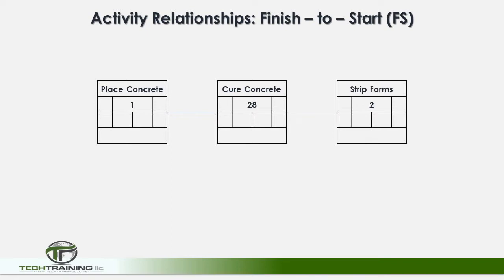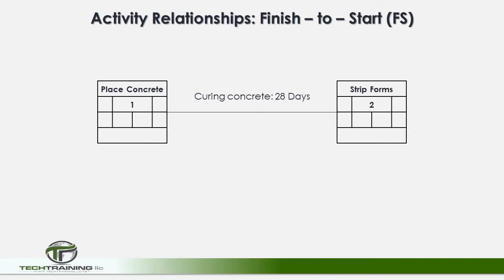However, since the activity of curing the concrete consumes no manual resources, only time, we may want to depict this same schedule as seen here, using the link line to indicate the delay between placing the concrete and stripping the forms. Once again, these are finish-to-start relationships. In other words, an activity cannot begin until its preceding activity has been finished.